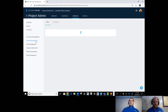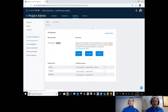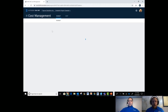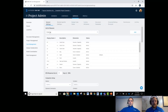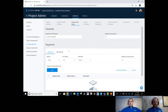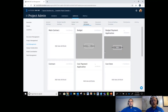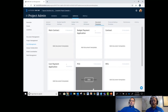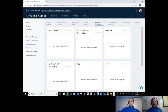Under Project Management, this is where you set up the workflows for RFIs and submittals. You'll see the RFI process here — you can change the workflow in terms of who the creator is, who's the manager, who's the reviewer. The same applies to submittals: who the manager is, who submits the packages for review, and who closes them. Under Cost Management, you can bring in general settings for units of measure — cubic feet, cubic inches, yards — your budget code setup, any segments or different codes, template building, custom attributes for the main contract, budget, cost payment application, document templates, PCOs, RFQs, different permissions, and an activity report.